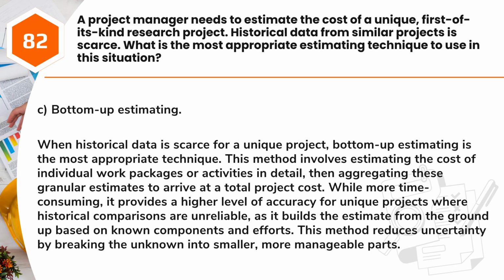Answer: C. Bottom-up estimating. When historical data is scarce for a unique project, bottom-up estimating is the most appropriate technique. This method involves estimating the cost of individual work packages or activities in detail, then aggregating these granular estimates to arrive at a total project cost.